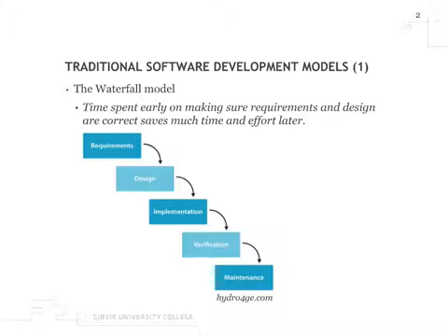This is the waterfall model. So what you do in the start of a waterfall model project is that you do a lot of design up front, we say. And that means that you specify the requirements and maybe design the system architecture, you design the data model, you design the user interfaces, the information flow, and so on and so on. So there is a lot of work up front.